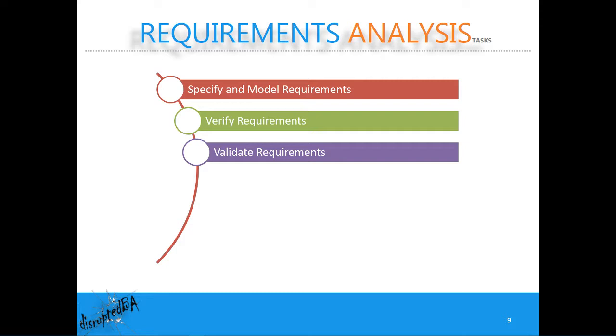Something very important, in that case, and I'll mention this again, is that it's never a good idea to throw away these types of requirements. Make sure you have some sort of a mechanism, a parking lot, something, a backlog where you can put it down as a very low priority. And I will reiterate this a bit later on again.